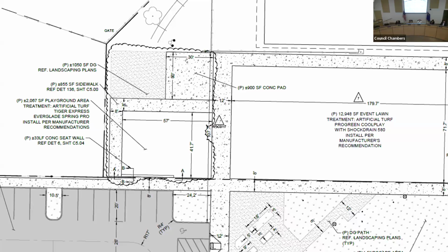So actually, we had the money in there for it. We thought we were paying for it. It actually was not in the guaranteed maximum price. If you were to look at everything in there, it said landscaping, but it didn't say artificial turf. So it was looked over.